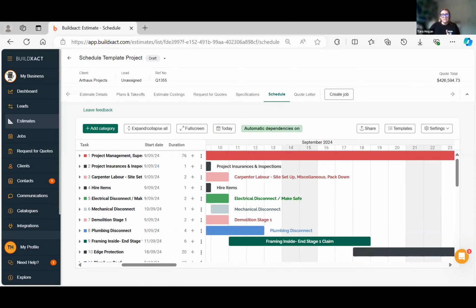and then also to the way that we set our stage claims, because understanding our stage claims, and I'm about to show you a spreadsheet of how I do that, shows me that my weeks account for what actually needs to happen, and if I've got enough flux in there if something does happen. You always want to be cash positive when you're setting claims, especially on a method B, which is where we've got a project a bit out of the box. So it's not a standard cookie cutter house, which I still think is method A, but I don't agree with that. But anyways, the banks want it sometimes. So just understanding how to set that out to then operate with your actual schedule here.